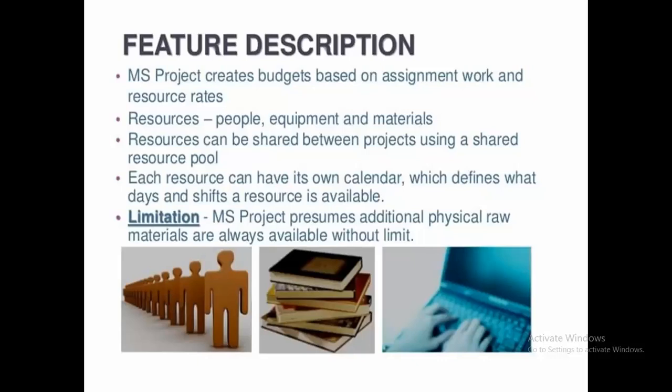Feature description: project management creates a budget based on assignment work and resource rates. Resources are people, equipment, and material. Resources can be shared between projects using a shared resource pool. Each resource can have its own calendar, which defines what days and shifts the resource is available.